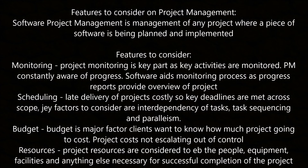Features to consider in project management. Software project management is the management of any project where a piece of software is being planned and implemented. Features to consider include monitoring, where key activities are monitored and the project manager is constantly aware of progress, with software aiding the monitoring process through progress reports. Scheduling: late delivery of projects misses key deadlines; key factors to consider are the interdependency of tasks, simultaneous tasks, and parallelism. Budget: the budget is a major factor — clients want to know how much a project will cost and that costs are not escalating out of control. Resources: project resources include the people, equipment, facilities, and anything else necessary for the successful completion of the project.